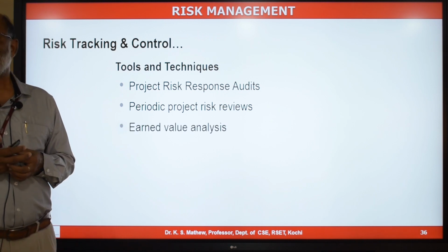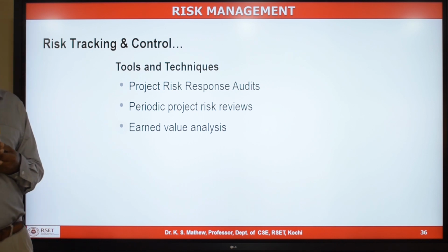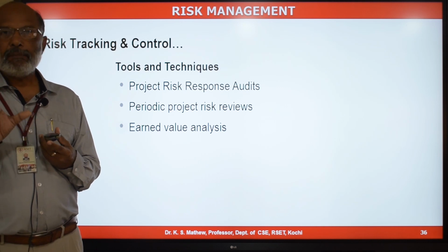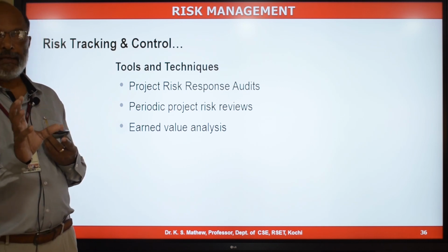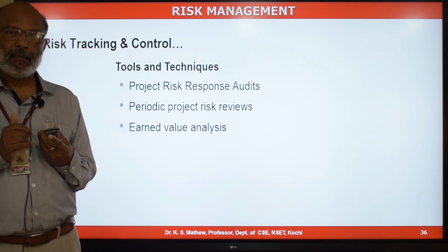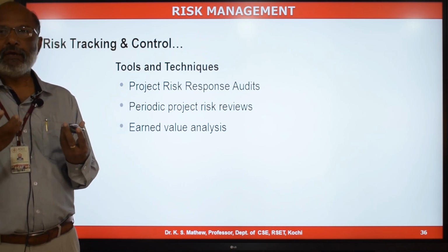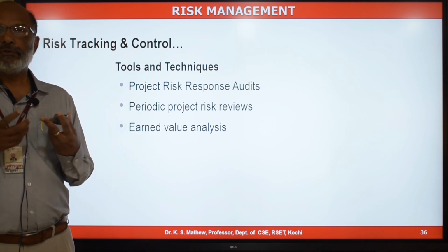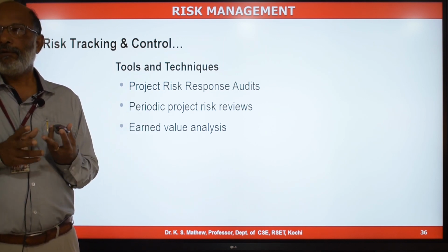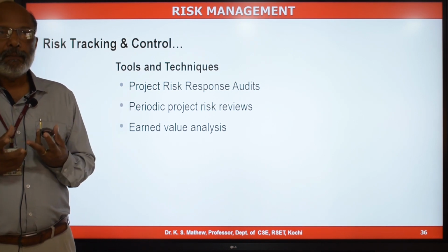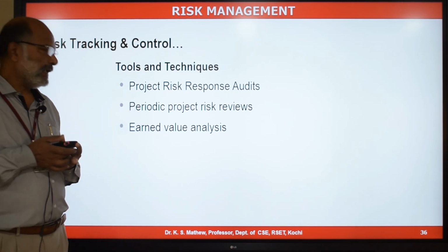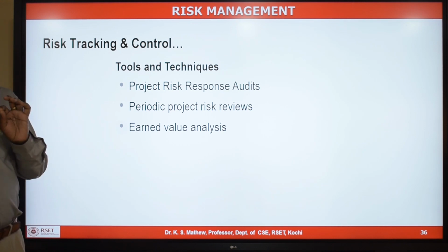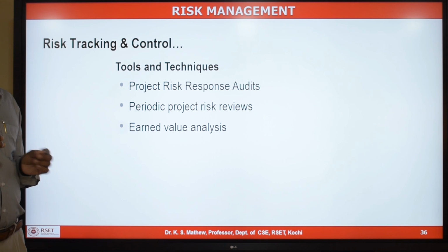Earned value analysis is a technique normally used for calculating the schedule variance and the cost variance while monitoring the project. So which will help you to see what is the schedule variance and the cost variance at this point of time. So which will help you to identify whether there is a schedule risk or the cost risk going to happen in the project. So then you can trigger the actions planned for that particular risk for schedule variance and the cost variance.